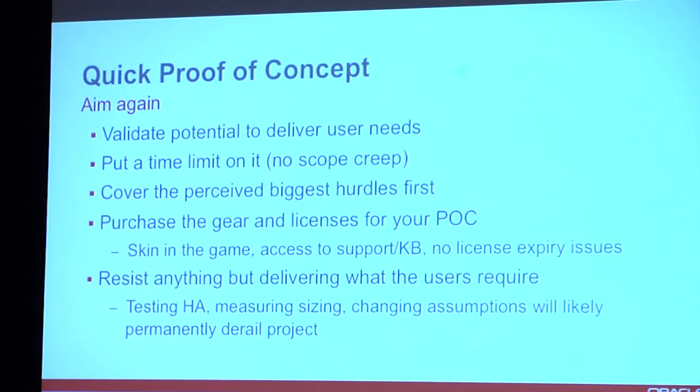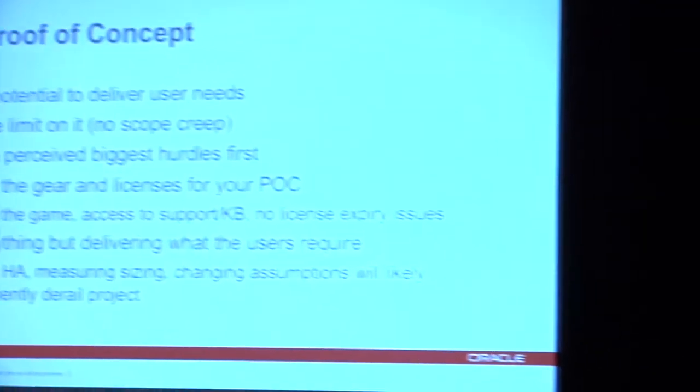The other thing that happens here is we all want to test the IT side of this. We all want to test, how does it scale? How do we manage it? How do we operate this thing? How do we deploy it? How do we stage and grow over time? And in the proof of concept phase, you don't have nearly enough gear, nearly enough users, nearly enough data to be focusing on those things. Because if you focus on all of those things and don't get to your user use cases, you've spent and wasted a ton of time and a ton of money.